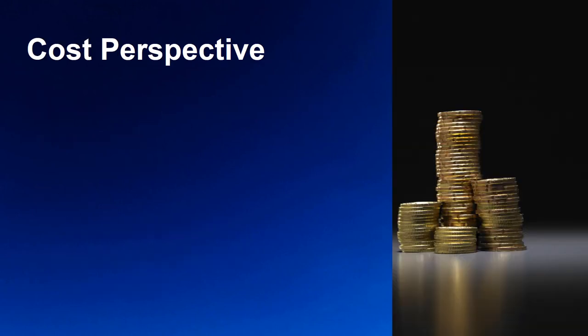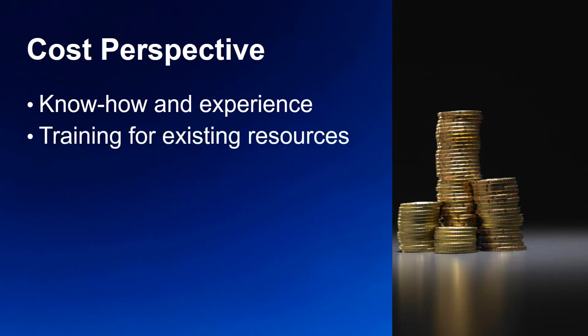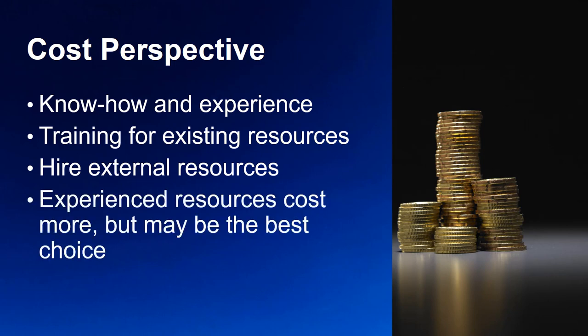In addition to considering duration when choosing resources, it's also very important to look at resources from a cost perspective. Each resource has a cost associated with it, and selecting one type over another can impact your project budget. Know-how and experience are also connected to cost — experience usually means greater productivity. If your resources don't have the appropriate know-how to perform a task, you must send them for training, which costs money, or hire external resources with specialized know-how. Remember that the more experience a resource has, that resource will usually also cost more.